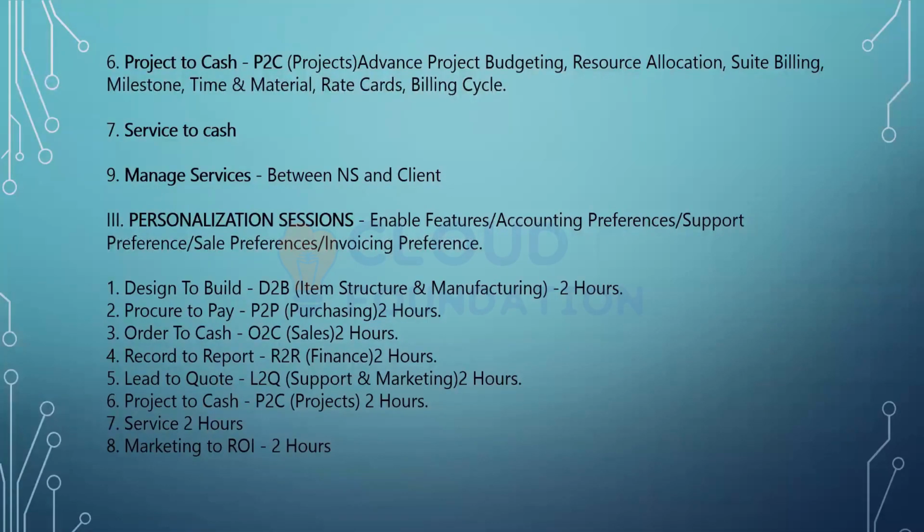Based on the role, the rate gets picked up automatically from NetSuite. I might have 10 functional consultants and 5 senior functional consultants, and I do not want to calculate based on each individual's booked time. So I define billing rate cards, and based on the role they are performing, it automatically picks up the rate.